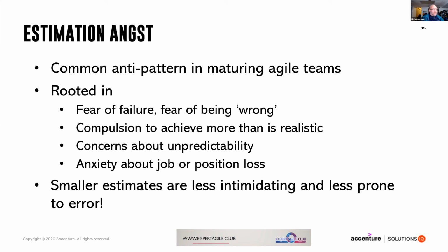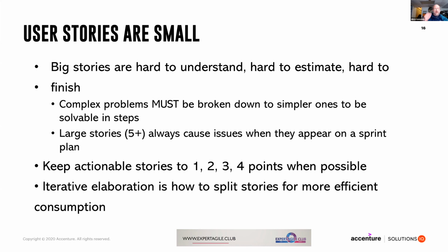I can tell you this, that breaking your work down small makes things easier to estimate. Smaller estimates are less intimidating and less prone to error. They cause fewer problems going through the system. Big things cause big problems, small things, small problems. User stories have to be estimable and small.